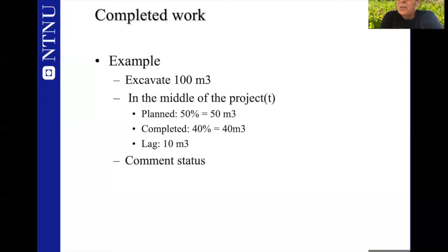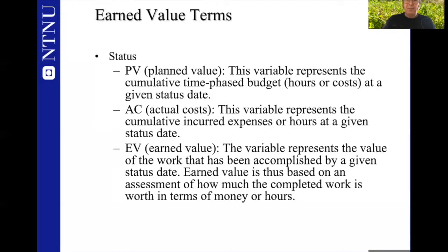So looking at costs alone, and looking at the scope alone or time alone, does not give us a good picture of the project situation. We need a tool, and here comes the earned value. We need a tool that links together time with cost and scope, and expresses it in a convenient way so that it can help us to track the status of the project. And this is the earned value.